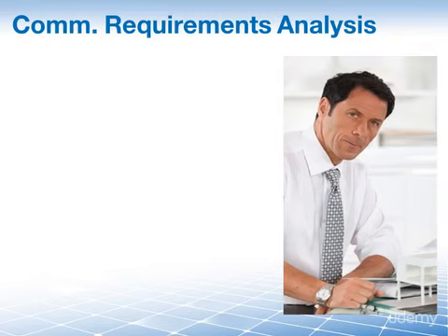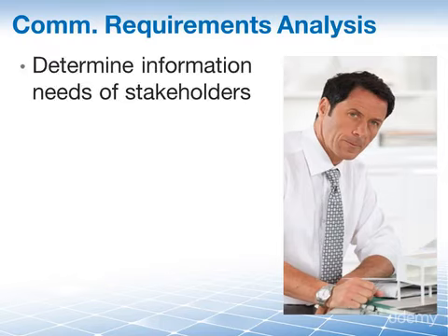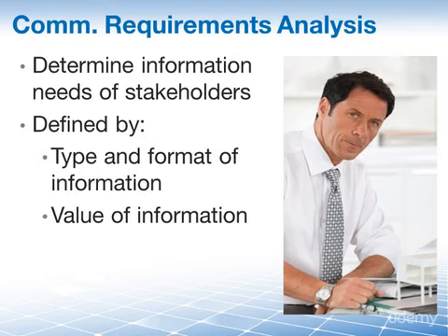And following this somewhat impromptu and unplanned homework that I've just given you, let's move on to our first tool and technique. Communication requirements analysis. That is a critical step in that you are gathering the information needs to properly plan your communications. The analysis of communication requirements determines the information needs of the stakeholders. These needs or requirements are defined by the type and format of information that is required by a particular stakeholder, as well as the value of that information to the particular stakeholder.